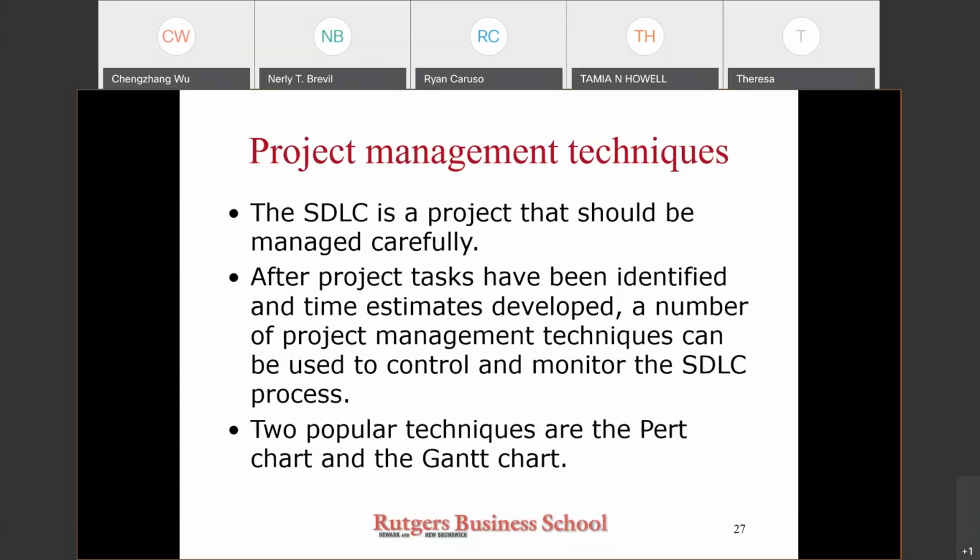At the initiation of the project, it is critical to list all tasks involved in each stage in the system development lifecycle process and estimate the time required for each task. Assigning system analysts and programmers to the projects is another important task that has to be performed.